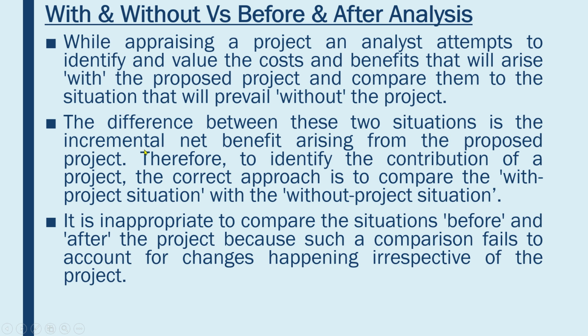It's very simple. Without the project, what could have been there, and with the project, what is there. So that is the comparison of with and without. The difference between these two situations is the incremental net benefits arising from the proposed project. Therefore, to identify the contribution of a project, the correct approach is to compare the with project situation with the without project situation.